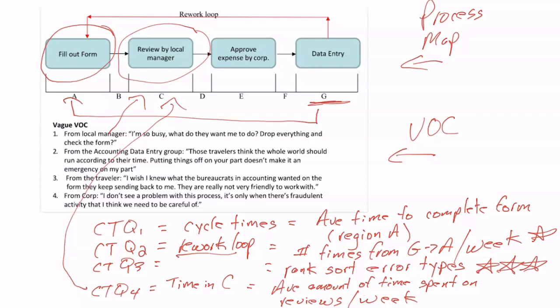Our job in the define phase is to craft these statements. We'll create a large list of possible CTQs. In the measure phase, we won't measure them all. We don't have enough time or resources to do that. But from this big list, we'll prioritize and choose the CTQs that are most insightful and useful for further current state analysis. CTQ development begins with statement creation and then ends in the measure phase when we actually go out and do data collection.